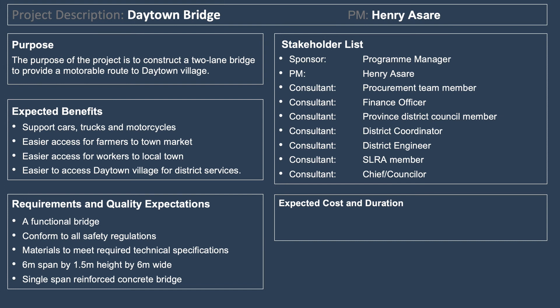For cost and timeline: the estimated budget is $42,000 USD with a contingency of plus or minus five percent. The project is expected to take a maximum of 12 months, with the actual goal being around 10 months. That completes the project description, which gives a very good direction for the project.